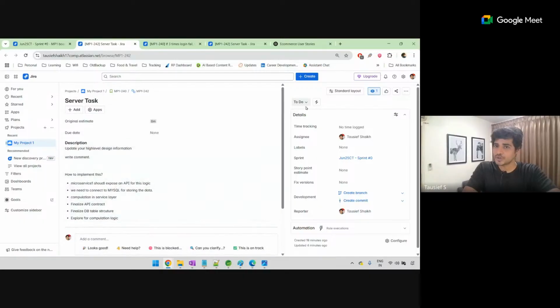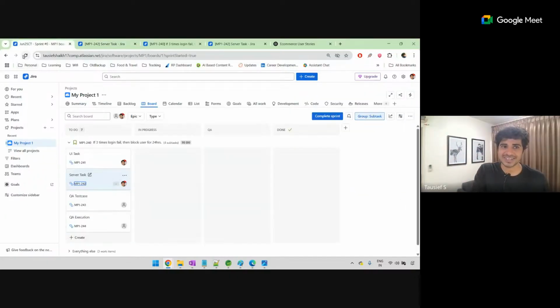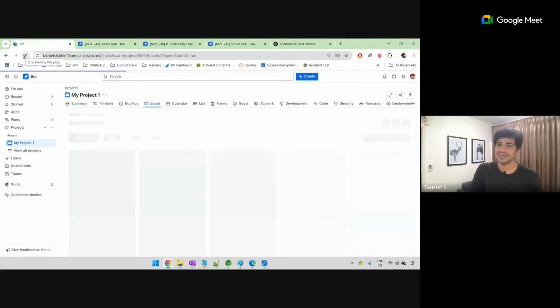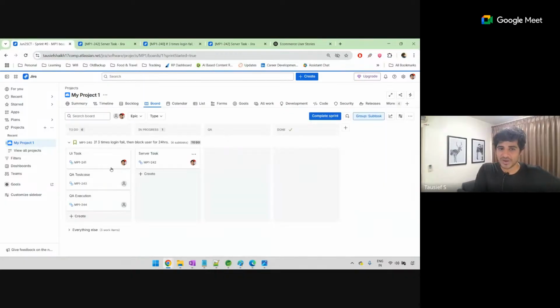You will just update it here as a comment. And then instead of to do, which means you have not yet started. In our tasks that we are tracking, there also we introduce similar statuses, right? In the daily task form that we are sharing, to do status means we have not yet started. In progress means we are working on this right now. So you will be changing the status based upon your work. So that is how it comes here. If I refresh, you can check it out. The requirements will be like this. So everybody in the team knows that for this requirement, only server development is happening.